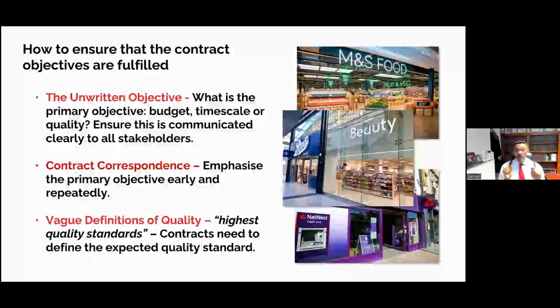Now, the unspecified, the unwritten lead element in that contract was time, completing in time for students to take their accommodation. As the contractor proceeded at what he considered to be the rate at which he could build, the project manager took umbrage because he wasn't moving as fast as he thought he should be moving, issued notices under the contract, and determined the contract. The contractor then turned around and, of course, because when the contract is determined it is the employer that he has to follow, he brought proceedings against the employer.